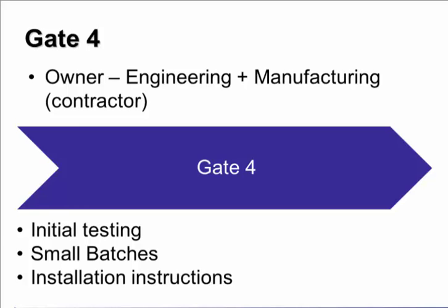They are then finished. The design will be finished. Installation, finish the assembly, and that then gets put to the installations, and if not installed, at least at the customer's, at the vendor site. And typically you may see a factory acceptance test occur as part of this process.